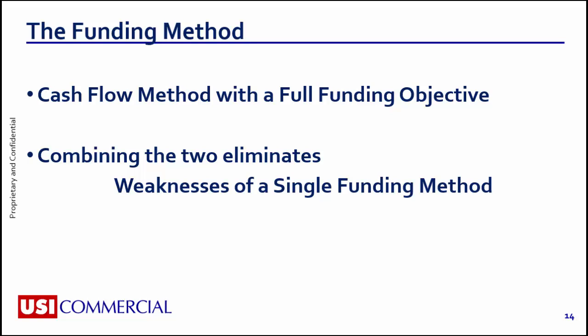Known costs are provided to USI Commercial in the form of invoices which the client provides, qualified contractor proposals, or directly from the client. If exact known costs are not available, present costs have been estimated by the reserve analyst's observations and experience, USI Commercial's proprietary internal database of costs, and industry-recognized cost reference guides such as the National Construction Estimator, RS Means, and the Engineering News Record Cost Book.